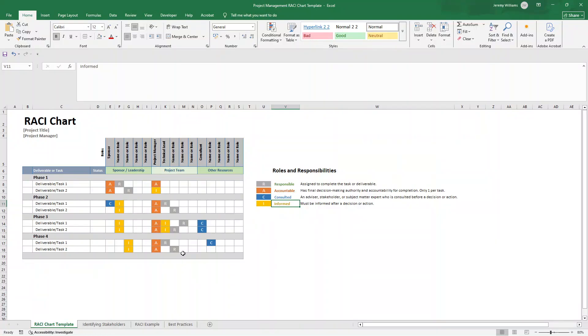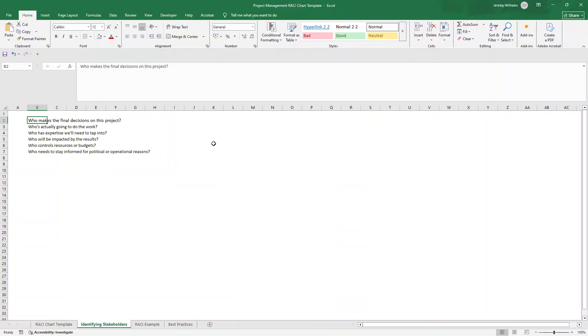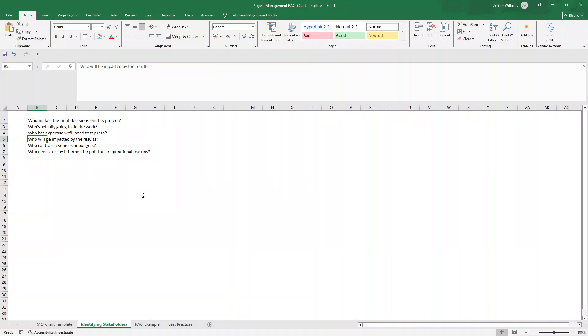So how do you populate your RACI chart? Firstly, it all begins with identifying your stakeholders. You can ask yourself these questions to help you do this. Who makes the final decisions on the project? Who's actually going to do the work? Who has the expertise that you're going to need to tap into? Who will be impacted by the results? Who controls resources or budgets? And who needs to stay informed for political or even operational reasons? So once you have asked these questions, you should have some individuals and project stakeholders in mind.